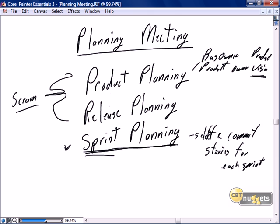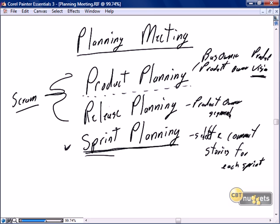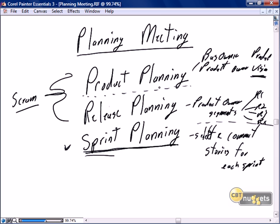The business owner and the product owner develop the product vision, then we kick off the sprint process. Outside of the sprint team, there's also release planning, primarily led by the product owner, who segments the overall product vision into release one, release two, release three through release X. This is where the product owner defines the major milestones for the project — typically resulting in an implementation and turning value over to the business.